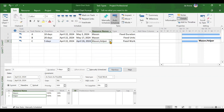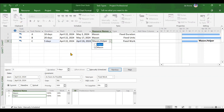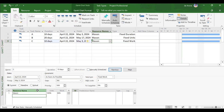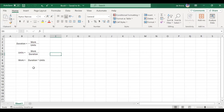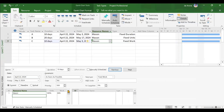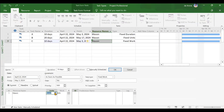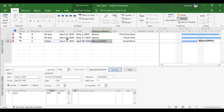Deleting helper and moving to the second case for fixed work: increasing units to 200%. Work remains fixed. Using the formula: work is 80, units is 2, so duration reduces again. Increasing units confirms duration has now reduced to 5 days.